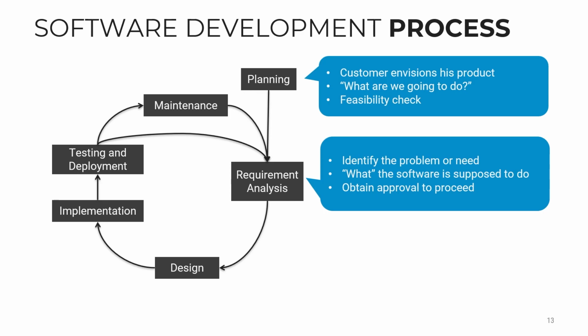This is the requirement analysis phase, and in this phase you might need to hire system analysts or professionals to discuss with the customers and the users what they need, what they want, and what it looks like. Here you might have a plan, a set of requirements, maybe some UI and UX design, to collect the ideas and make sure this is the concrete thing that we are going to do. Maybe not 100%, maybe 30, 40%.